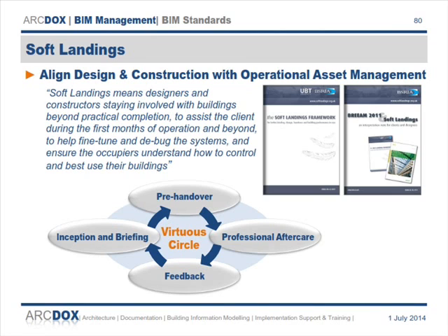So what they're asking is for designers to stay involved for 3 years post construction to do a series of measurements over that period to demonstrate that the building is actually performing to the standard that the brief called up. And if it's not, why not? So that's challenging, I think, to make sure that your building is actually achieving what it says it would.